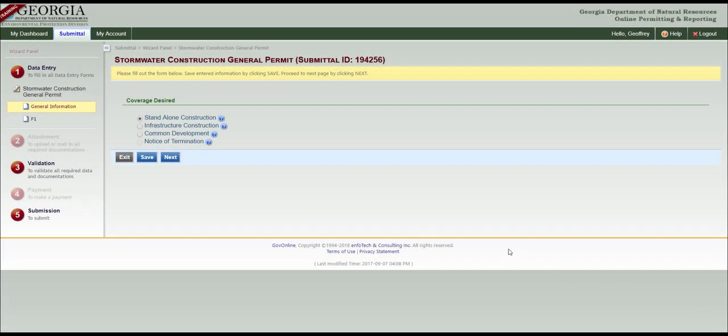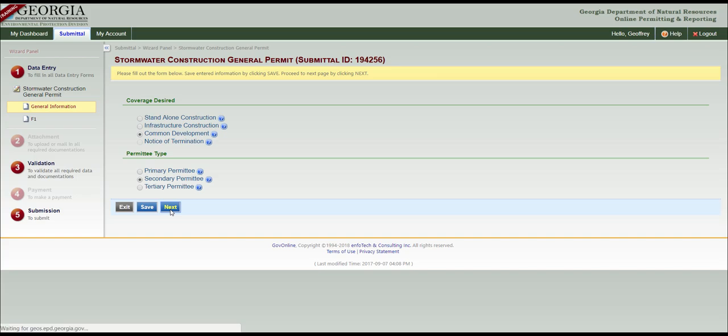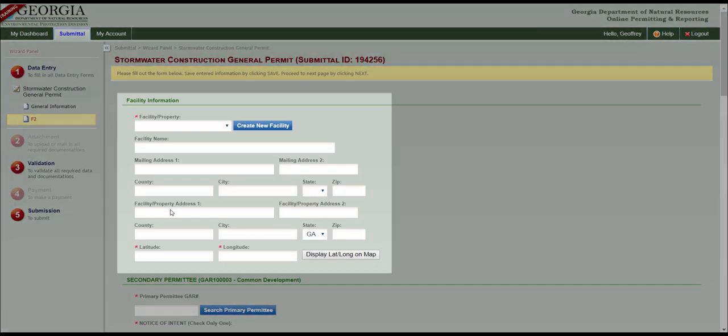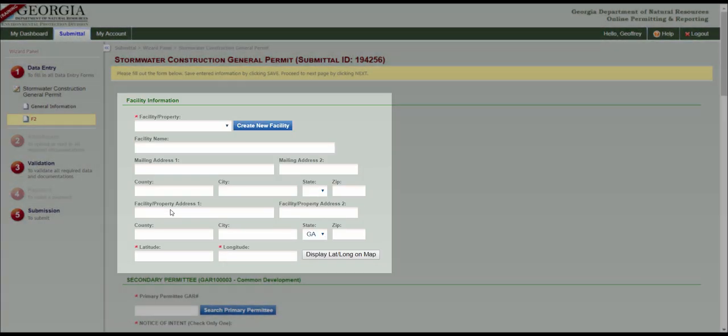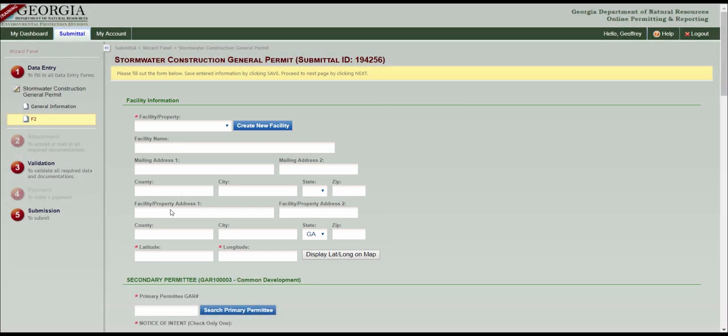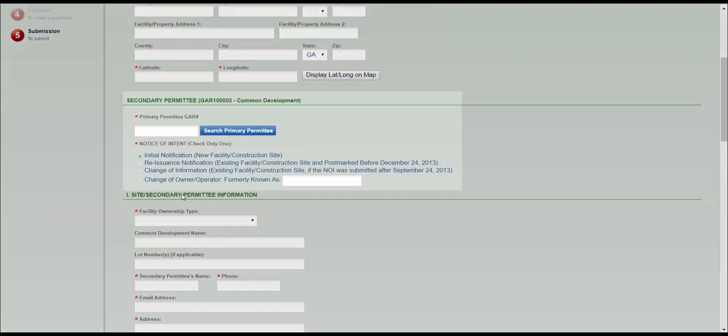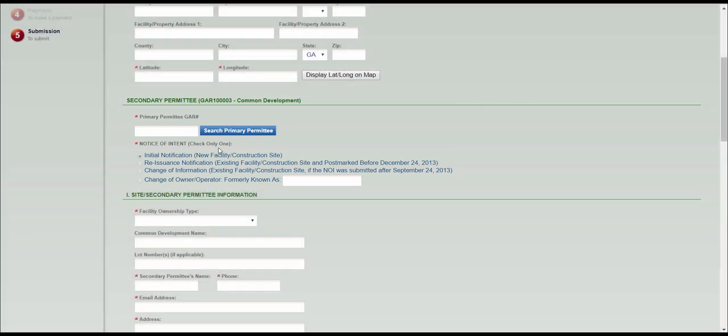If your coverage type is common development, you can assign the primary permittee to the secondary permittee by selecting Secondary Permittee, clicking Next, choosing your facility as has been covered, then scrolling down to the Secondary Permittee section and clicking the blue Search Primary Permittee button.